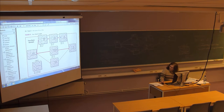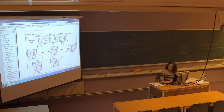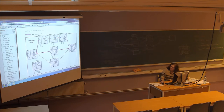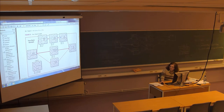If something gets used up earlier, this node will have less free slack available. Where there's only one node in an intermediate chain, the free slack is equal to the total slack, because there's nothing preceding it. These are chains that are not part of the critical path, so there's no slack on the critical path itself.